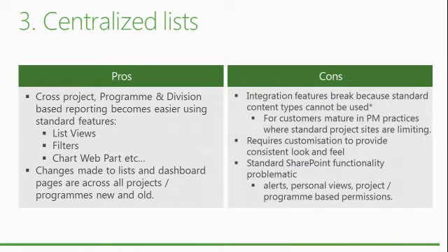You can make changes easily to your dashboards, and it will be reflected across the board. So you add a column to a list, and it will be on every single project. You can add new dashboard pages and different views. You could use audiencing in your menu systems so that the IT team sees a certain view and the HR team sees a different view, but they're still using the same schema underneath. So it's still apples with apples, and you can still do your cross-divisional reporting, cross-program reporting, etc.